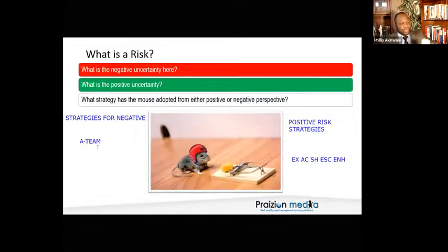So if the passive accept answer is there, I would go with that. Because if it doesn't say sending a team member out to gather data to reduce the possibility of occurrence, it's accept. And if we don't know that Phil is doing anything with the data, it's as passive as can be.